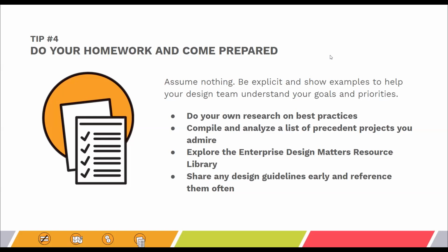So it was a joint effort to bring our criteria of the spaces that we wanted, and then the architect helped us think through what are all of the other pieces that we might not be thinking of, especially from an infrastructure side. But it is important to note that typically programming is not part of the architect's basic scope of services. So it's okay if you do need help thinking through those things, but just recognize that it might come at an additional fee for them to provide those services.